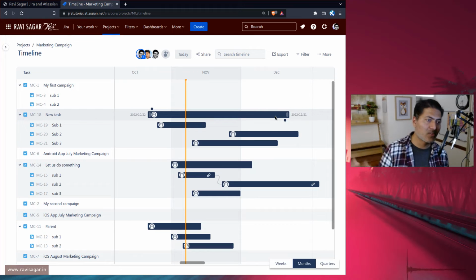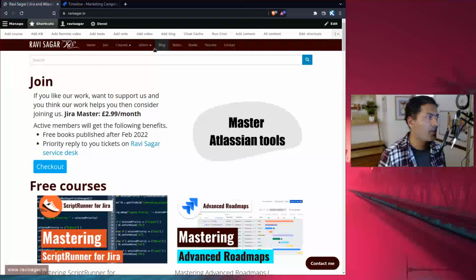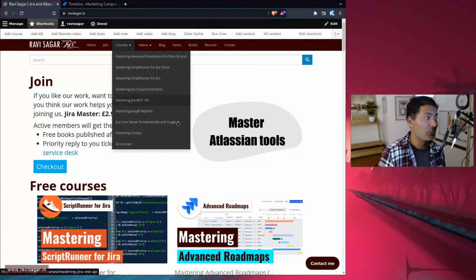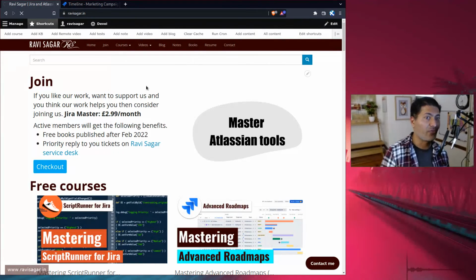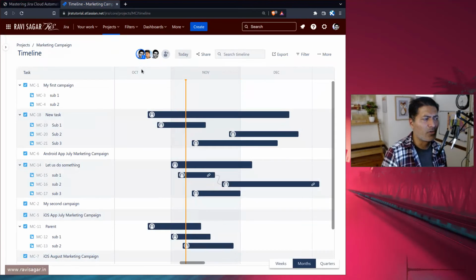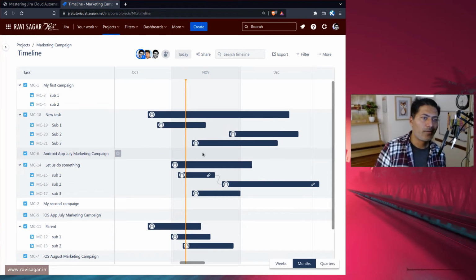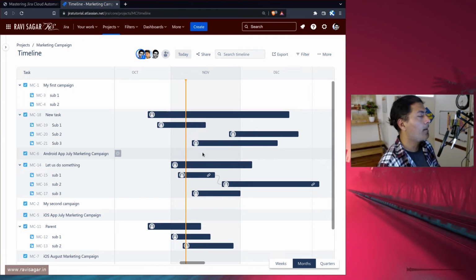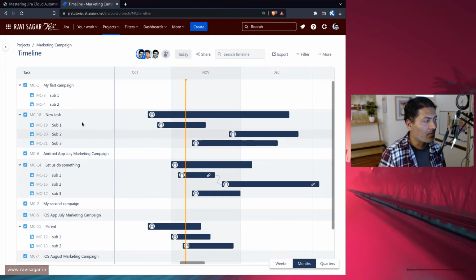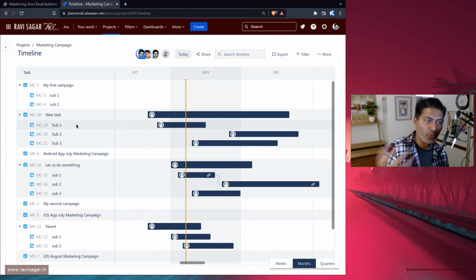And although there are automations that you can do, I'm sure you have seen my video, right? If you go to my website ravisagar.in, you can go to my Jira Cloud automation videos, like free videos, and you can learn about these wonderful things that you can do. So out of the box, Jira will not really shift the dates for you. So you have to write your own automation rule. Number 1, if you close your subtask, like if you change the status, your parent activity will not automatically get transitioned to resolved or closed. You have to do it yourself or use automation.